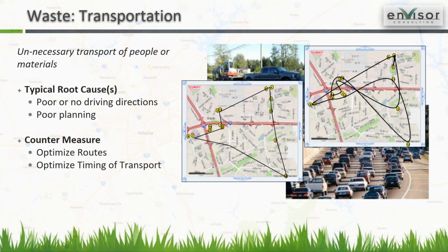Transportation is a form of waste. And look, in our business, we have a lot of transportation. We service real estate, so we spend a lot of time in the trucks. In fact, I do believe that there are some companies out there that spend as much as 20% of their labor hours just in transportation. But there's nothing physically changing on the customer's job sites in transportation.